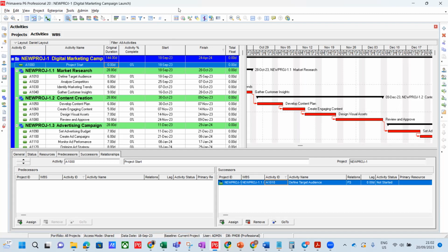You have a pool of resource, but you're just looking at that job. Okay, Daniel is working on a project now. We expect Daniel to finish on that project and come and start this. However, the project has got some complications. We don't know for now, we're still dragging it. We don't know when that project and the task we gave Daniel on project B is going to finish. Tentatively, let's put, because Daniel is a design engineer, and we've got a task in project A that needs a design engineer.